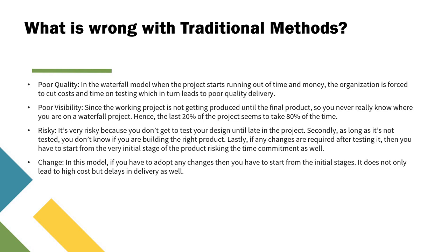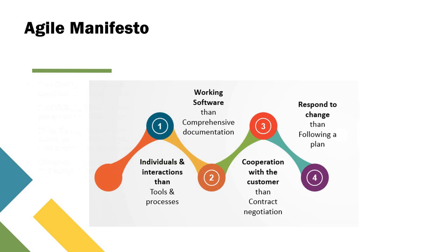Change. In this model, if you have to adapt any changes, then you have to start from the initial stages, and this also will lead to high cost, and this also delays the delivery. So considering these issues, agile has developed.